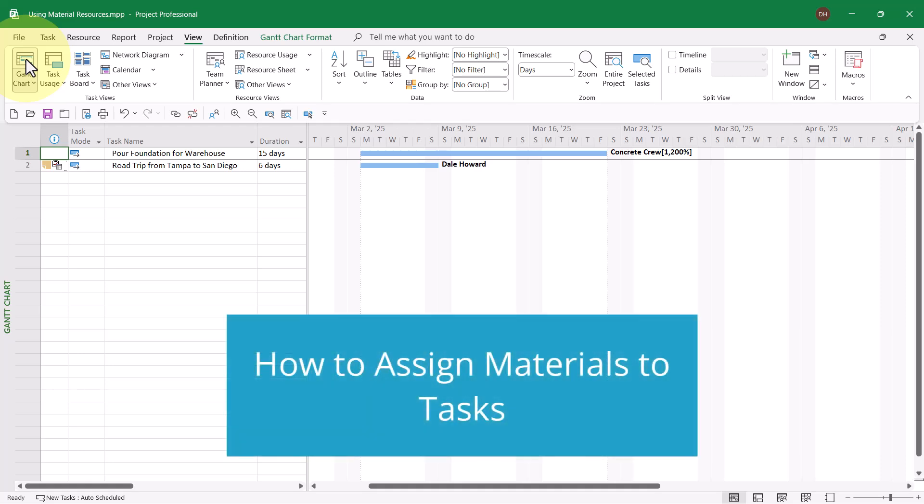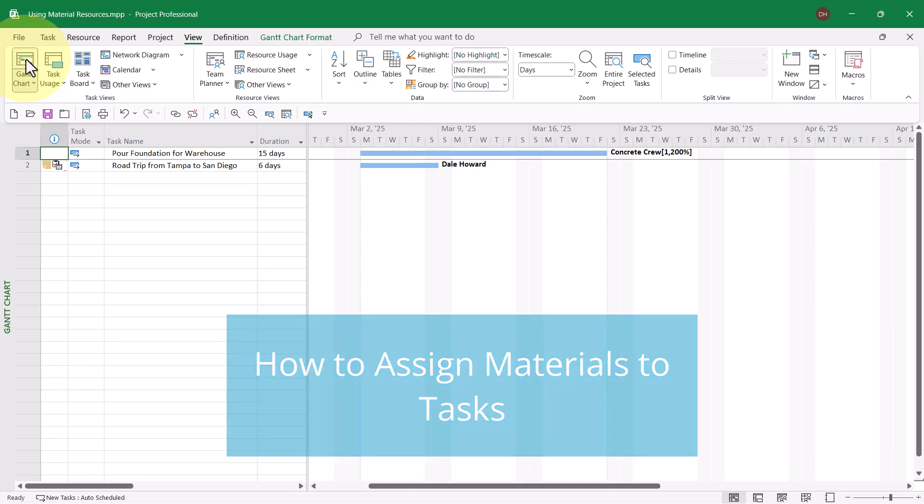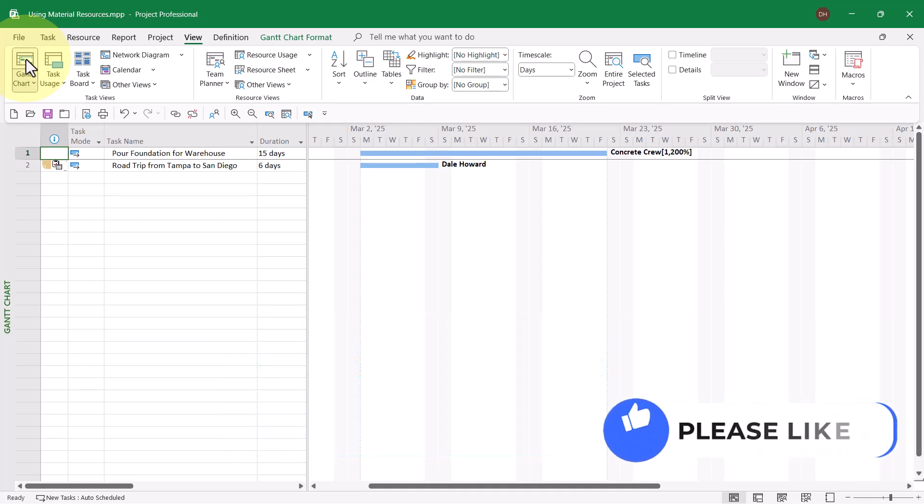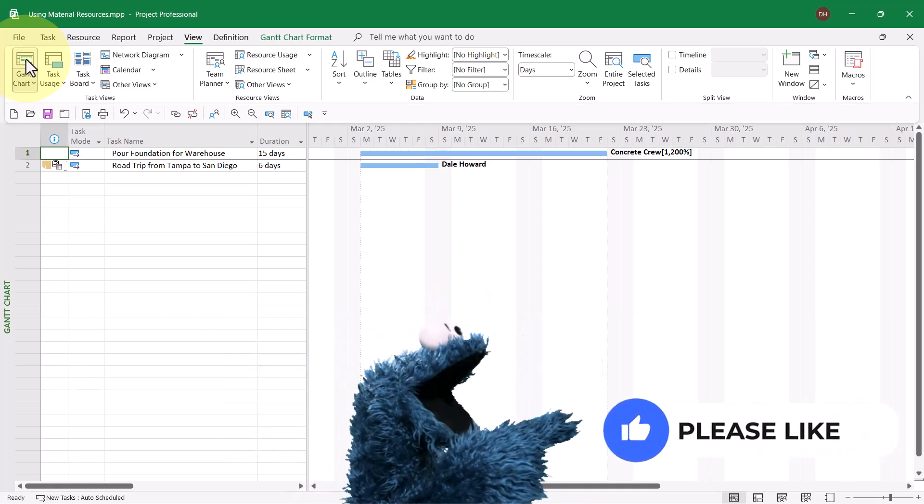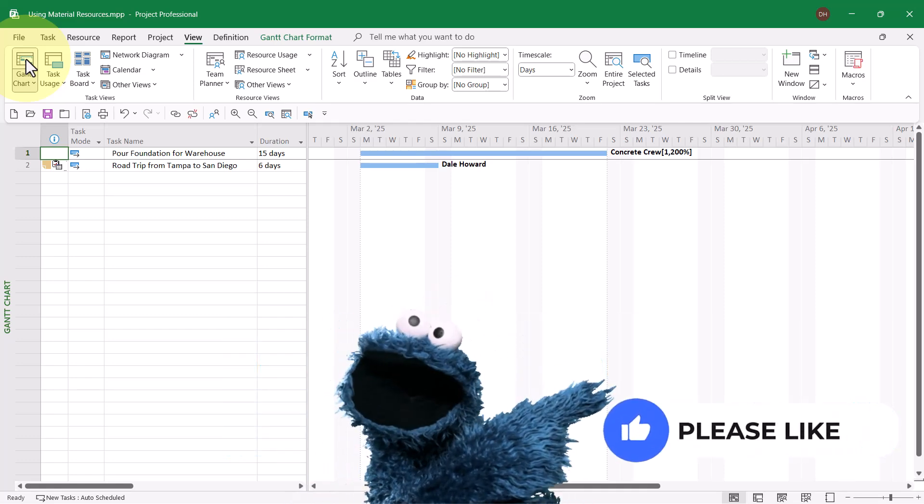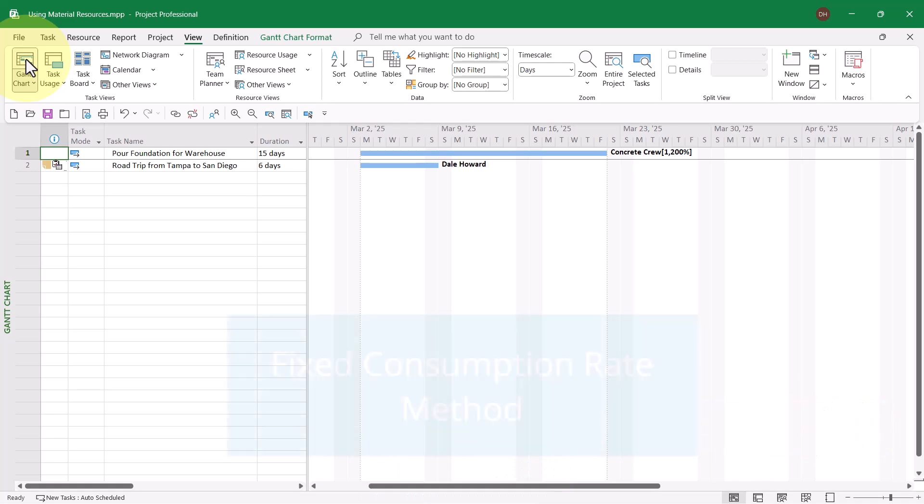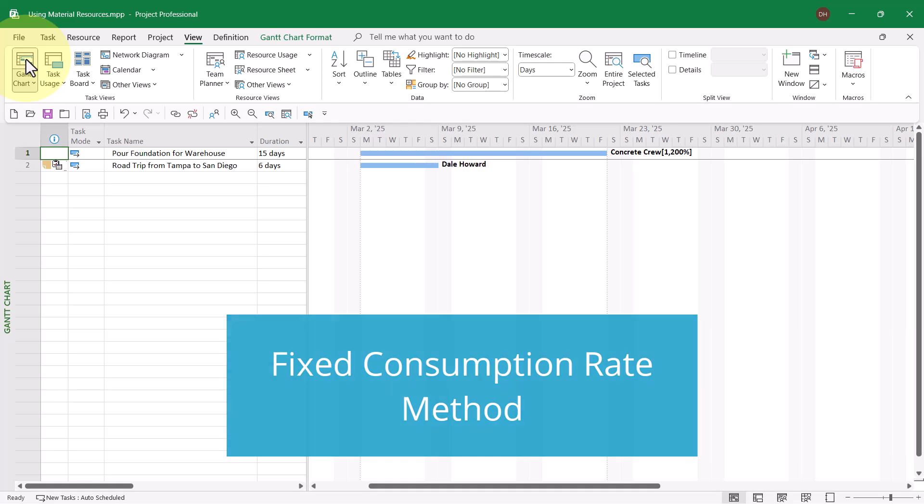There are two methods for assigning material resources in Microsoft Project. The first method is known as Fixed Consumption Rate. You use this method when the amount of the material resource consumed does not depend on the duration of the task.